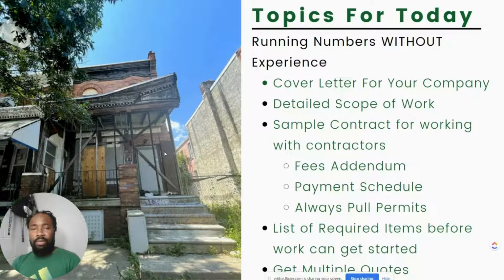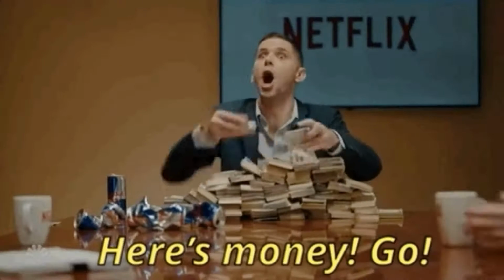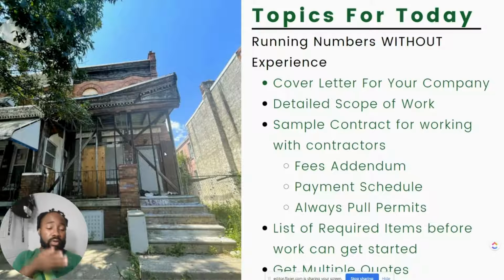What you don't want to do is pay somebody half of the money. No, no, no. That's what you don't want to do. So make it clear up front. Don't wait to have an awkward conversation about it. You can say, we pay 30% up front, 30% when it's done, and then the remaining 30% once it passes inspections. We typically get that money out within no more than 5 business days. Boom, that's your payment schedule. Everyone reads it, they understand it.